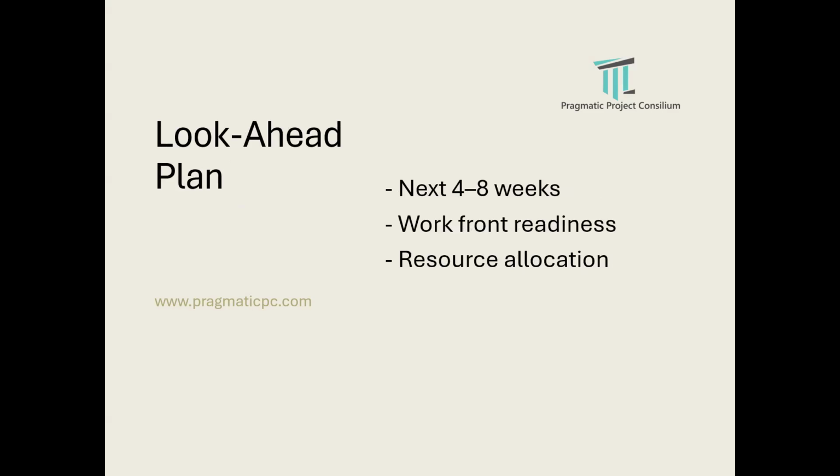There should always be a look ahead plan of 4 to 8 weeks, which is a very minor plan, so that you can very closely monitor and execute them. So whether we have the workfront readiness, necessary permits, necessary resource allocations, whether the subcontractor has mobilized, all of this has to be in the look ahead schedule. The look ahead schedule will have more information for the 4 to 8 weeks than the general schedule, which has more generic information about the entire project.